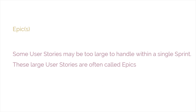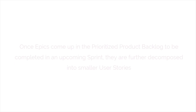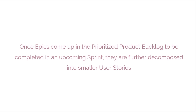Some user stories may be too large to handle within a single sprint. These large user stories are often called epics. Once epics come up in the prioritized product backlog to be completed in an upcoming sprint, they are further decomposed into smaller user stories.